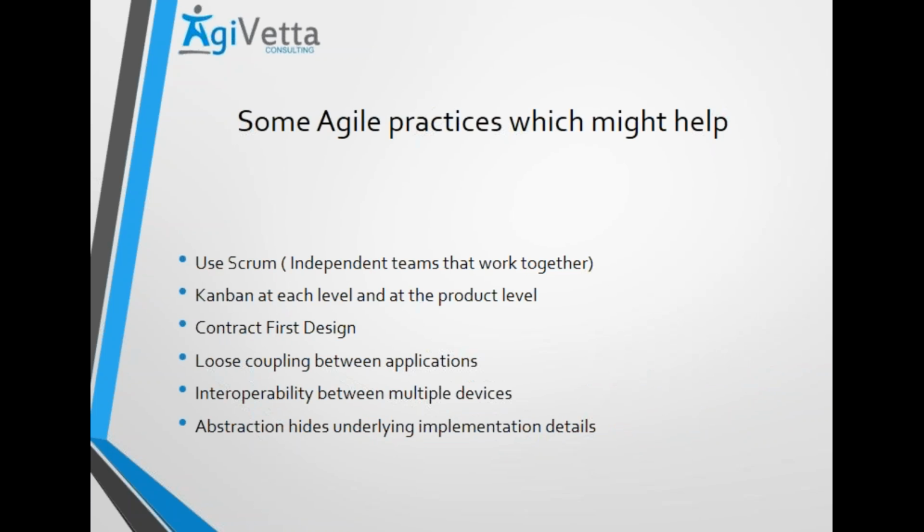So for example, while working on the specific design parts, when I talk about system design, looking at and involving purchase, you might want to use Scrum and iterate maybe every week or every 2 weeks on how the work is going on. Where are we with respect to purchase? Where are we with respect to different manufacturers? Same you can use at a mechanical specification level, and you can use it even at a PCB design level when you are purely in a design stage.